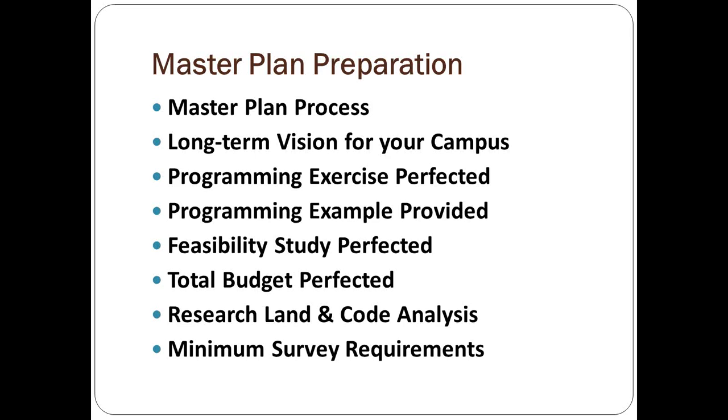Now, I'm giving you minimum topographical survey requirements. This was provided through the years by industry professionals, and we've added to it through the years to be a tool, and so there's lots of folks to thank for putting this together. You can get one from the surveyor or from the architect, but for the time being, this may serve you well. You ought to show on the survey existing buildings, their location, size, and their finished floor elevations.